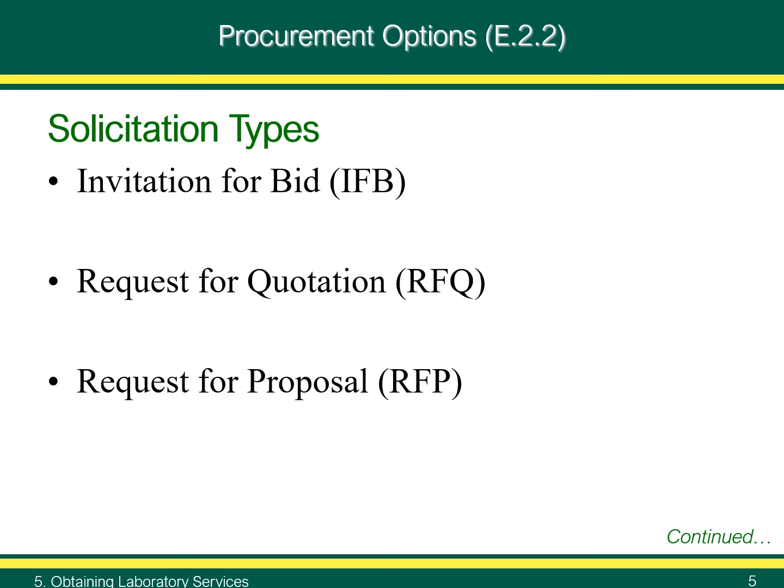A third type of solicitation is the request for proposal, or RFP. Requests for proposal apply to proposals to establish contracts under FAR's negotiated procurement process. It is suitable for procurements where the approach must be flexible or tailored to circumstances that cannot readily be defined in advance.